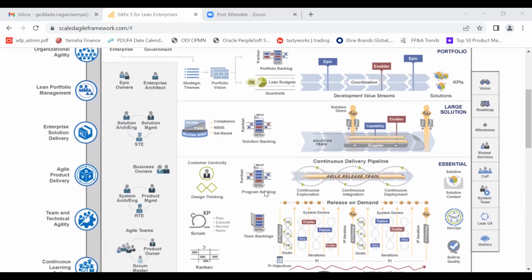Once the business approves this and gets the execution or implementation, it gets divided into features. A feature is nothing but a splitting of epics into manageable components, which can be delivered by a program increment. Within the PI, you are able to deliver this feature. A feature is just one simple transaction.